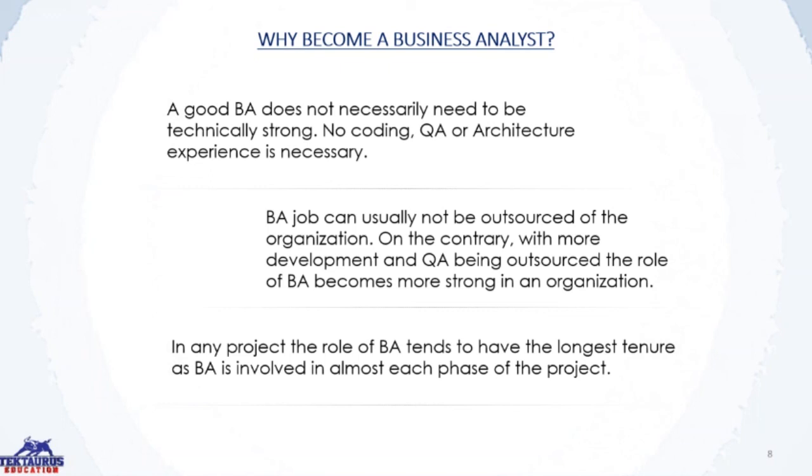And each time a business analyst is involved, not only to do the requirements, but also to do impact analysis. If one thing changes, what are the 5 other things that will get impacted, small or big? The developer can say, this is just a 2-line code change for me, and it will take me only 2 hours to do it. A QA team can say we will take 2 days to test it, but only a business analyst can fully say what is the impact of a certain process change.